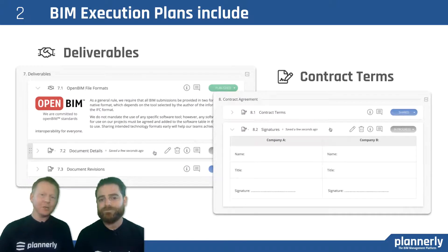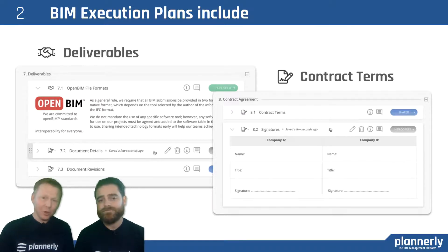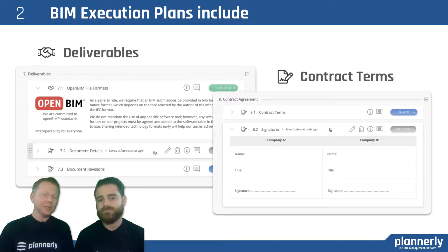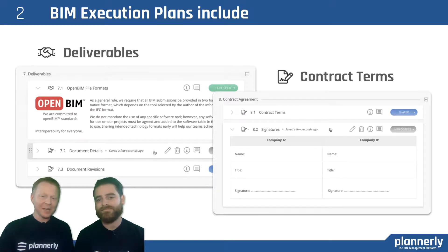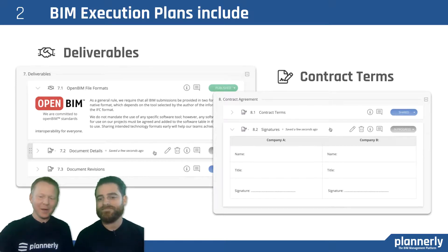Then deliverables — how do you define your information requirements and your handover, and essentially the format that you are looking for? We recommend Open BIM standards and IFC as a file transfer. There are other requirements that people put into contracts as well, and this needs to be a contract. On the right-hand side, we're talking about adding a signature block so that we can actually get people's buy-in — contractual buy-in.